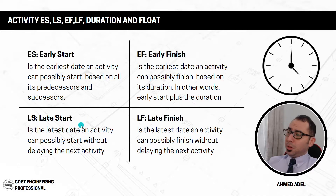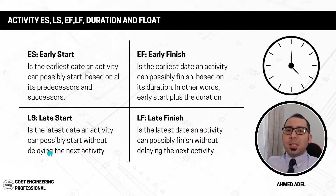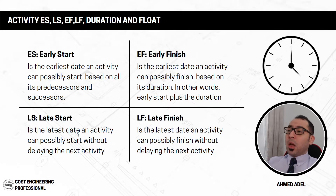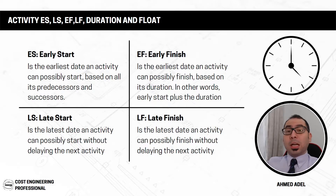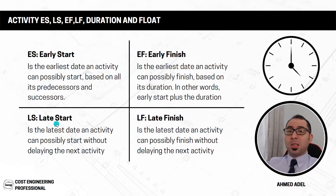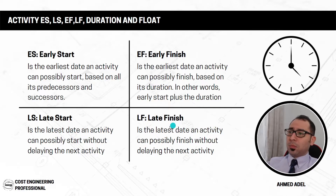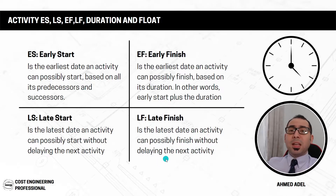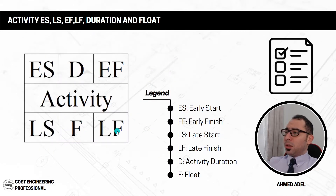The late start is the latest date an activity can possibly start without delaying the next activity or the project overall. The activity will still take its full duration, but it must not push the next activity back. Similarly, the late finish is the latest date an activity can possibly finish without delaying the next activity or delaying the project.